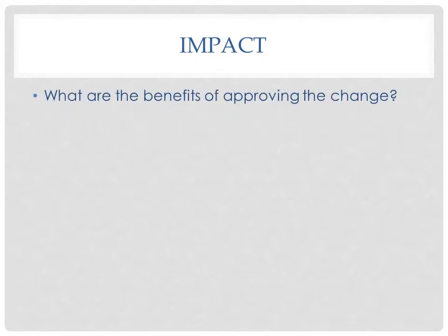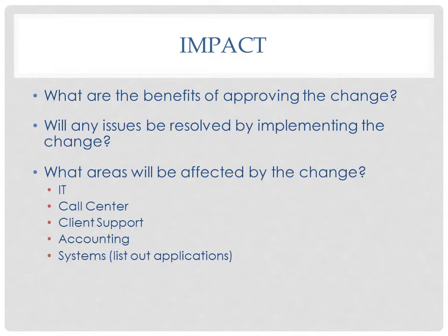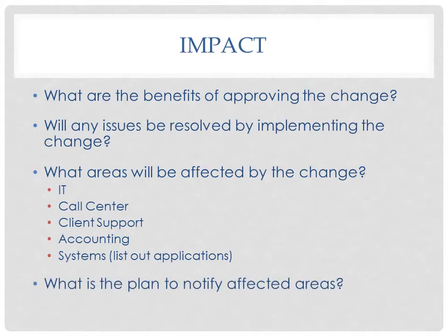Those assessing the change request will want to understand any impact to the project, such as any benefits realized or even issues resolved. If there are groups outside the project team that will be affected by the change, be sure to list them by name, and also include at least a high-level plan for notifying each affected area.